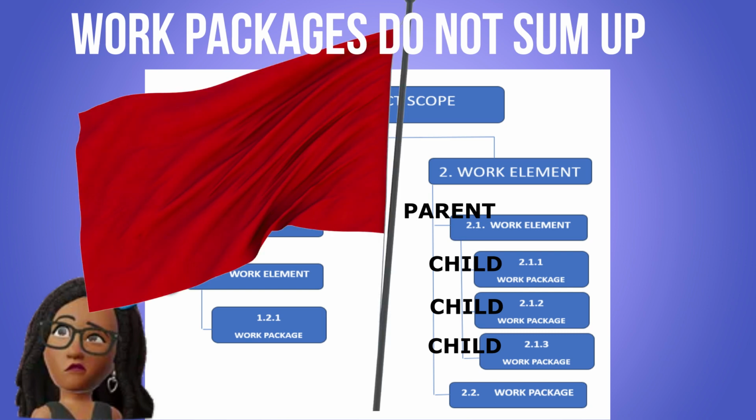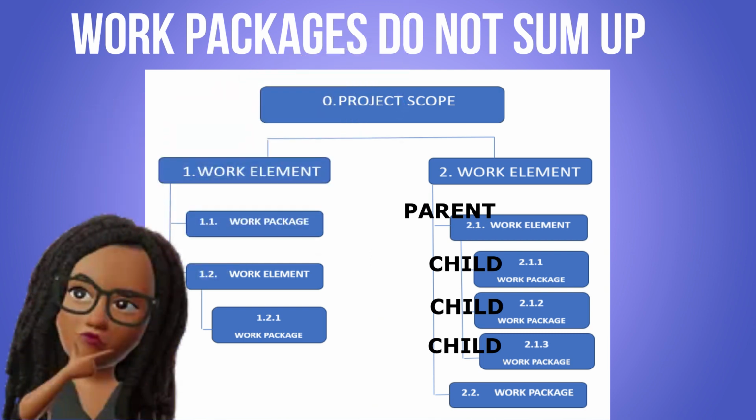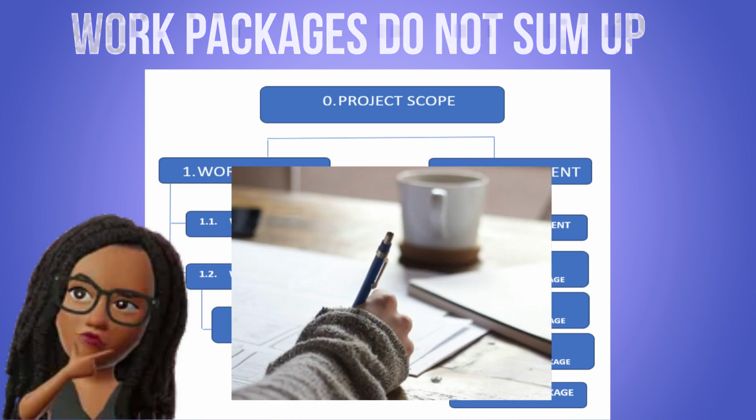At this point, you need to stop and consult with stakeholders and/or experts to determine the missing parts of the WBS. If the missing pieces cannot be described, they should be noted as scope risks.